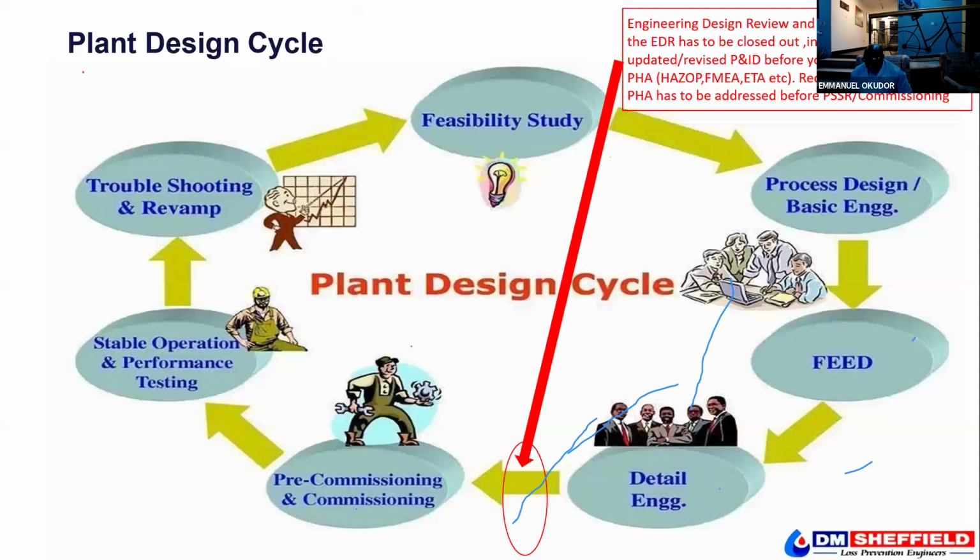I went to the Gulf of Guinea and coincidentally they were carrying out maintenance of offshore production plants. They couldn't get anywhere to drain the oil because drain valves were missing, omitted during the design. So it is either two things. You might have a very good engineering design review, come up with recommendations, go back to your drawings, integrate them, fantastic drawings. But the other issue is what?